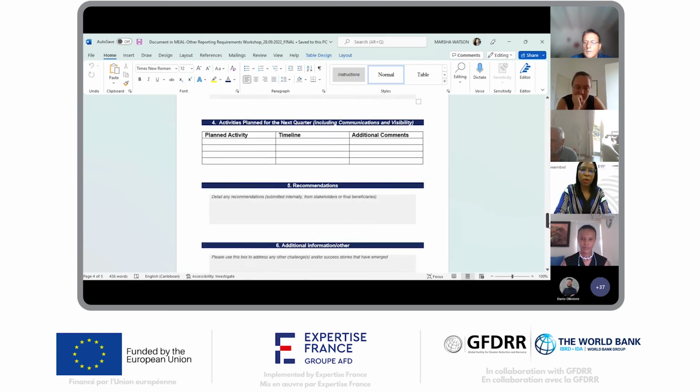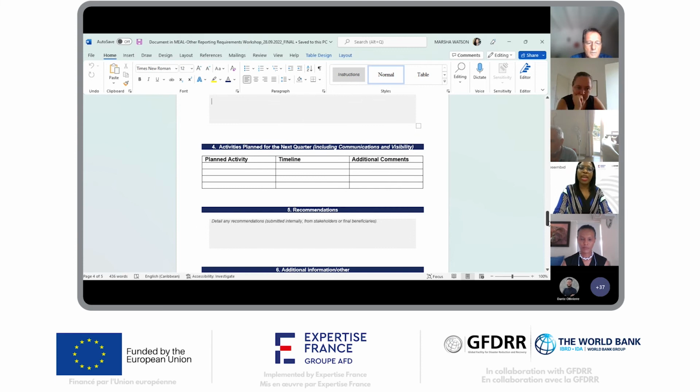Now for section 4, we do ask you to indicate the activities that are planned for the next quarter, including communications and visibility activities. So we enter the planned activity, the timeline from X date to Y date, and any additional comments.